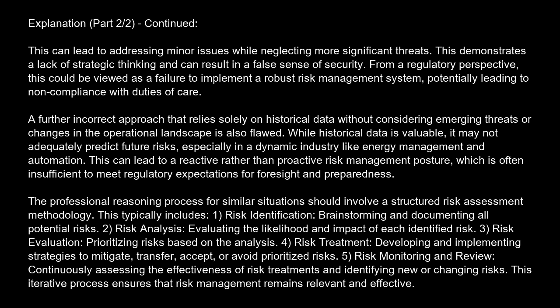This typically includes: 1. Risk identification, brainstorming and documenting all potential risks. 2. Risk analysis, evaluating the likelihood and impact of each identified risk. 3. Risk evaluation, prioritizing risks based on the analysis.